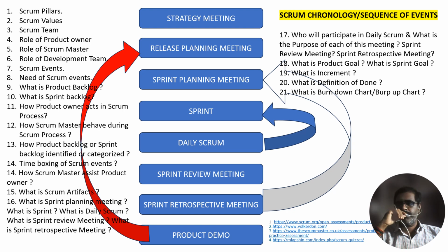If the definition of done for an increment is part of the standards of the organization, all the Scrum teams must follow it as a minimum. If it is not an organization standard, the Scrum team must create a definition of done appropriate for the product. The developers are required to conform to the definition of done. If there are multiple Scrum teams working together on a product, they must mutually define and comply with the definition of done. So, these are the important things considered in Scrum.